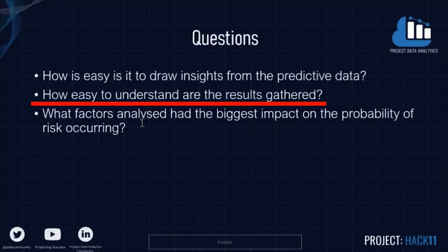When understanding the results gathered, our dashboard clearly provides each mitigation a threshold budget. This was presented on the main table visualization. This budget should be compared with the estimated cost of a mitigation to give a go, no-go decision.